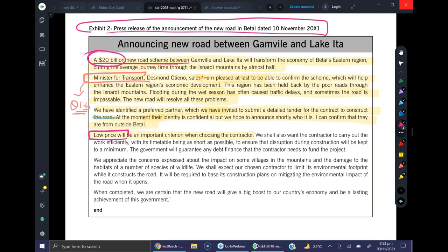Yeah, it will increase more, it can lead to more wastage of materials maybe, which also means more cost. We will be hiring machinery, etc. So more days means more cost for that. So a lot of aspects can go wrong. So low price might be difficult to achieve. So that's difficulty number 1 we have to talk about.